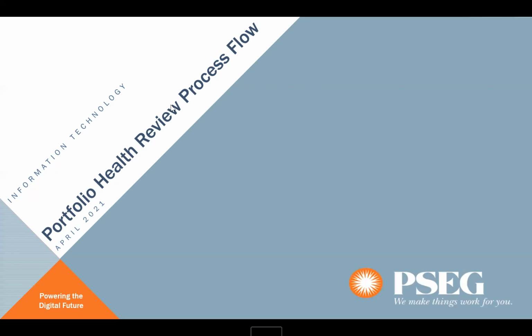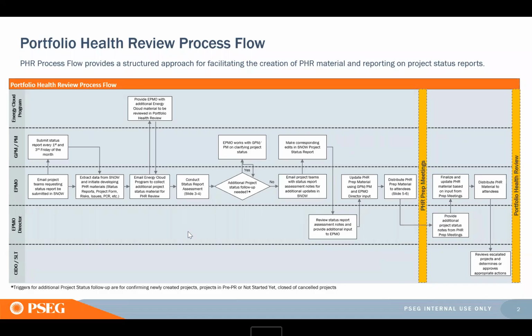All right, so your project status reporting, this will be quick and we'll take a break. Your project status reports are extracted from ServiceNow, like I said, usually the first one of the month, depending on if that gets delayed, sometimes the third one. So whichever one is right before those portfolio health prep sessions and then the portfolio health meeting with the senior leadership, they'll pull that from ServiceNow. It's a bunch of massaging, a bunch of reviews, and then there's prep sessions that are set up to get additional information and get ready for that executive and senior leadership conversation.